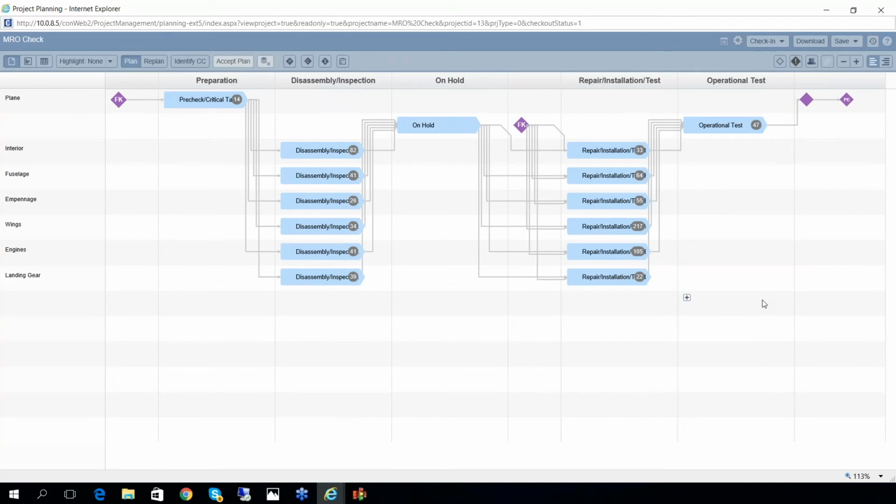Right? And in this project plan, what we have established are two full kit points. One is a full kit before the first task starts, which means all the approvals that you need, all the engineering changes that you need based on the repair that you knew before you started the actual work on the aircraft, are available before you actually start work on the first task.